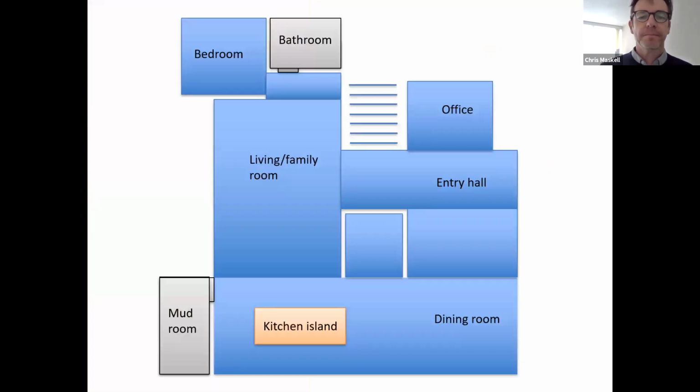What's the problem? Well, this is a plan view of this home, and I'm not sure if you can see my cursor, but the homeowner was walking around the kitchen island when we just saw that video. Problem is, this was a home that was built January, installed the floor sort of February, March, and then the builder left the place unoccupied for 6 months, put it on the market. Eventually it was bought in September. So it's been empty for 6 months. This is a problem because it's become dry. What happens when people move in?